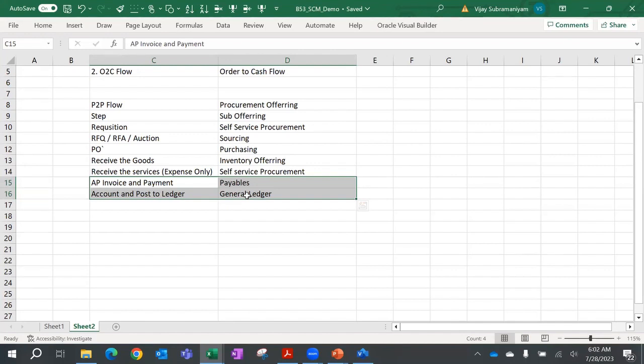Sir, I have a question here. Yes. It is actually from RFQ we create the requisition and then requisition to PO, right? No. Requisition will be the very first step. Only if you know what materials you need can you float the RFQ to the vendor. For example, if the engineering department comes and says I need 1,000 cement bags, then you will find the supplier who can provide 1,000 cement bags.